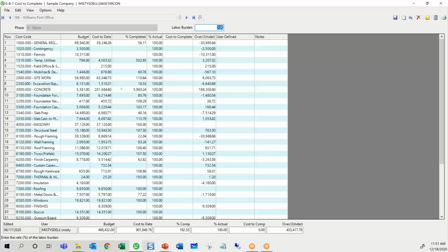So you could use an internal change order to toggle that information. So if you create an internal change order to these cost codes, adjusting by the over under billing amount, then when you create an internal change order, you mark it as approved because that's how it hits the job and the books. And then if you wanted to go back in time and see how you did on the original budget, you could just make that change order back to review status. And then it works as a toggle switch. You turn it off and on by controlling the status on the change order.